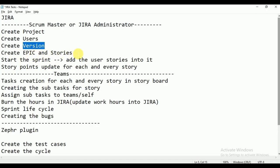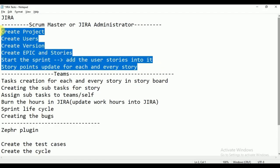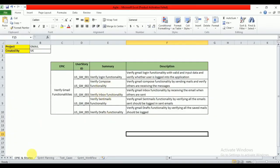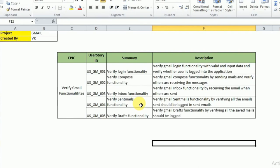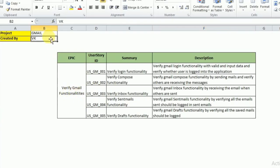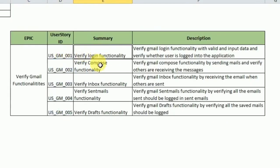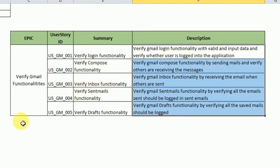Please remember all these tasks are done by the scrum master or Jira administrator. So, coming to epic and stories — my epic name is 'Verify Gmail Functionalities.' This epic has five user stories: verify login functionality, compose functionality, inbox functionality, sent mails functionality, and drafts functionality. Like this, the epic is divided into multiple user stories, and each user story we are going to verify something.